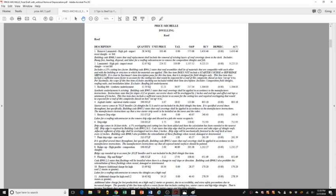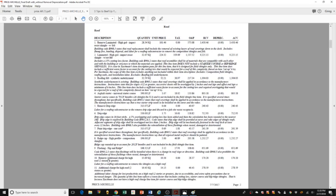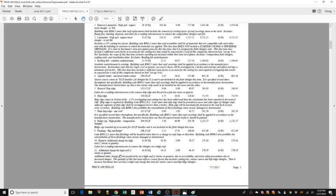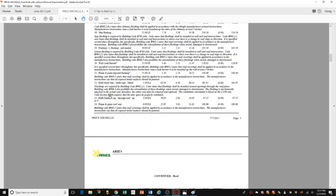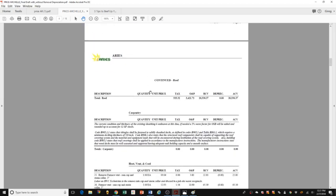We have an explanation for drip edge. We have an explanation for the steep and why the steep is necessary for the removal. Pipe jack flashings, building code for priming and painting the exposed flashings. There's a building code related to 85% of every line item in this scope. It's not just because we want it, it's because it belongs there.